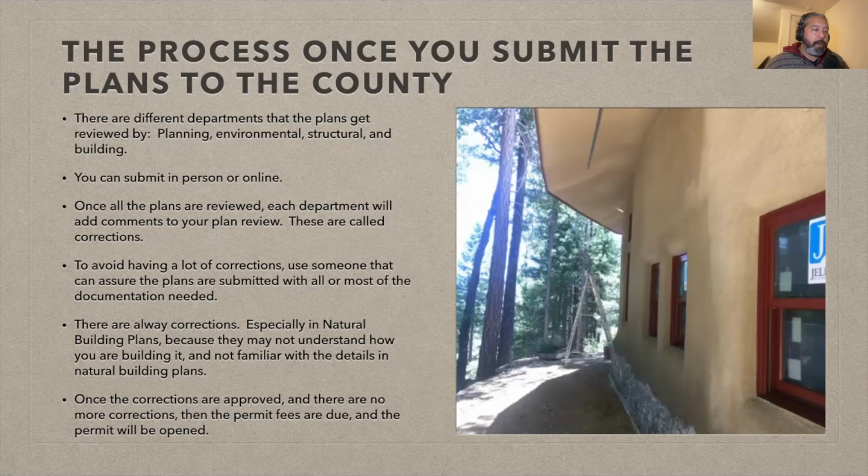Once all the plans are reviewed, each department will add comments to your plans, to your review, and these comments are called corrections. To avoid having a lot of corrections, use someone that can assure the plans are submitted with all or most of the documents needed. Again, that goes back to that checklist.